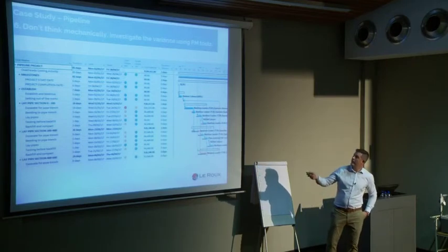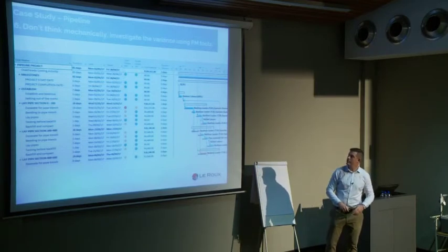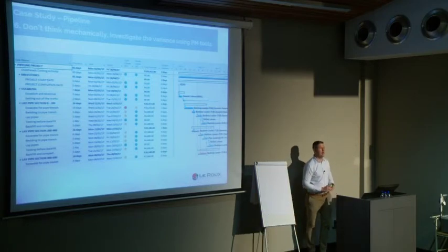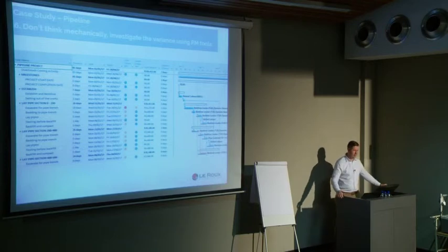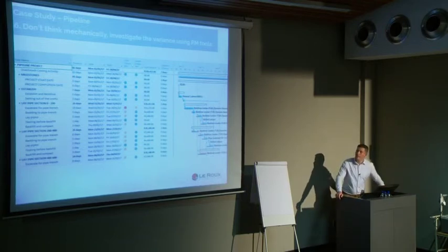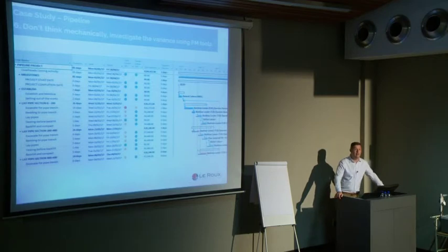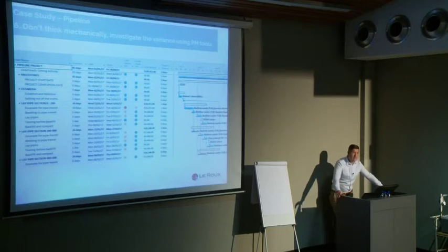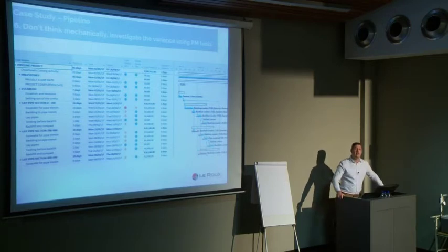And you'll see there, if I look at my cost variance KPI, those unfortunate unhappy faces just indicate wherever we have a cost variance, meaning a positive cost variance there means that we are overrunning the cost in terms of what we've planned. So let's take a look at the bedding of the pipe trench there. It's got no duration variance. It means we did it in the time that we planned, but there's a cost variance of about 4,400. What could be the reason for that?